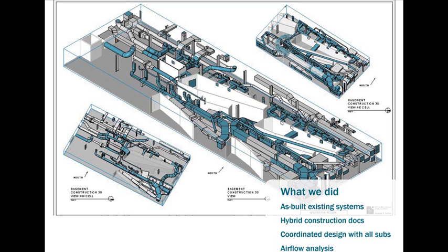Knowing how complex this basement was going to be and how we had to shuck and jive around a bunch of existing stuff, we couldn't just simply wipe it clean and start over because we wanted to save the client some money. We modeled the whole shebang. Every bit of duct that we thought was going to be in the way of what we wanted to do, we modeled. And once again, we just used a tape measure and the distometer and went down there with a cart and my computer and a pair of headphones. I was down there for about a week, and we modeled everything.